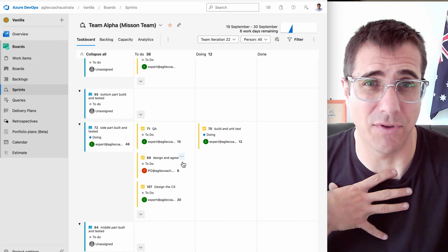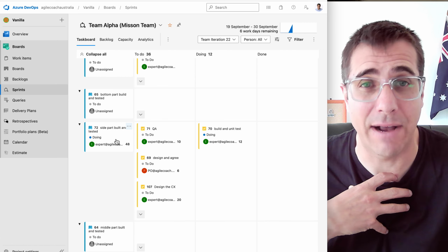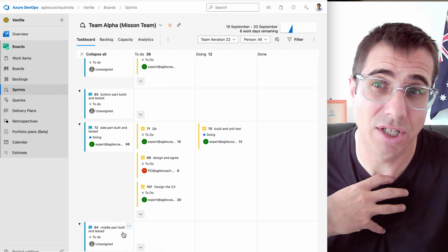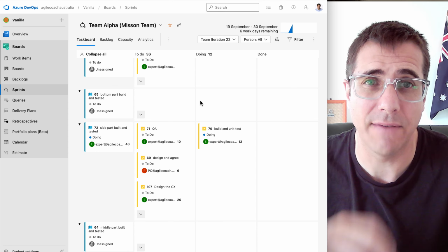And if you're the Scrum Master, that's a benefit because you can see towards the end of the sprint whether you're going to get the outcome that you promised, and you can start to think about taking suggestions to the team, that they don't go on the bottom one and we move people to the top ones so that as a team the effort's done.